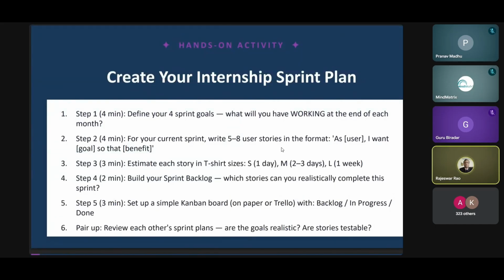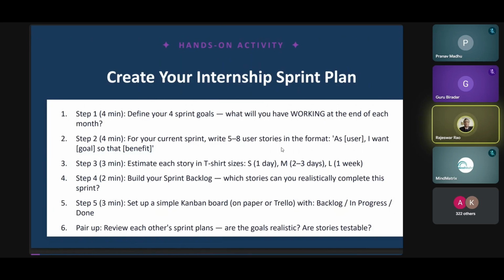Once you define your sprint for that week with a clear-cut understanding about what you need to be done, what you need to build, what you need to deliver, what are the sprint goals you need to achieve, I think your life is well sorted and well laid out in front of you. Have this plan ready. My suggestion is create a detailed sprint plan, get it reviewed by a mentor or a project manager, or do a peer review, baseline it and stick to that. It doesn't take much time to do a sprint plan, not more than maybe initially about half an hour. After that, you actually get used to it.